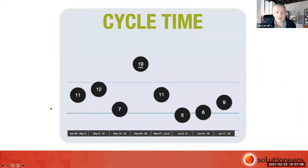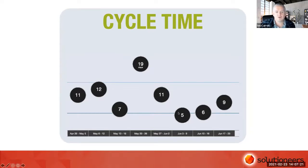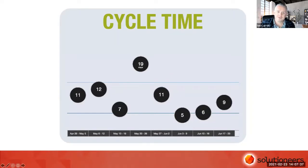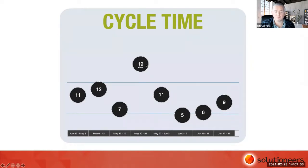In this graph, this item took 11 days, this one seven, five, six, nine. Using standard deviation, we can work out the expected predictable boundaries of the dataset. This is a very predictable team — they should be able to deliver any work item somewhere between six and 14 days. But there is an outlier — something that took 19 days. The team should use this as a diagnostic tool, because that 19-day work item could give insight into what's causing them to become unpredictable. That's one way to visualise and render cycle time.